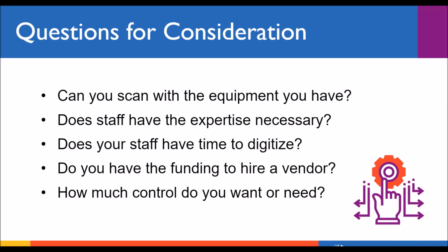So looking at some examples, if you are digitizing a large-scale project of common formats like documents or photographs, and your staff has the training and bandwidth to do it, it's probably more cost-effective to purchase the equipment and do it in-house. If you have a few specialized formats that would require a substantial financial investment to digitize, it might just be cheaper and easier to send it out to a vendor.